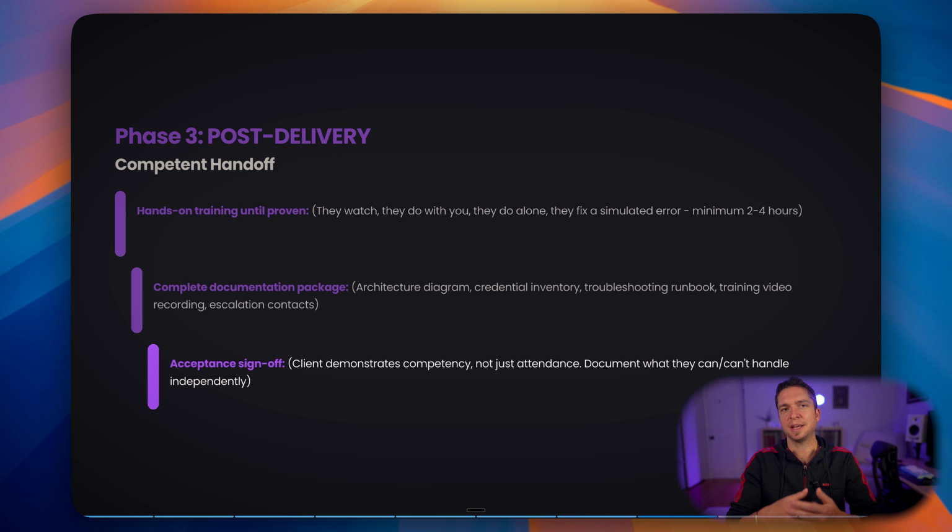And then finally, acceptance sign-off. This is obvious for most people, but when you're wrapping up on a call, you want to make sure that you get sign-off from the client. Yes, we love your product, blah, blah, blah. When you get off the call, you follow up with an email saying how great it was to work with them, and you make sure that they respond saying something similar so that you actually have sign-off from them on completion of the project. We have now met the definition of done.